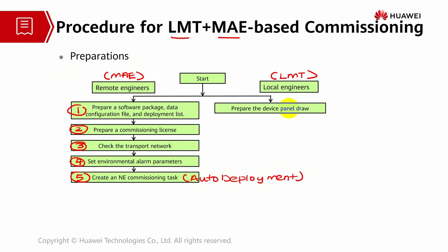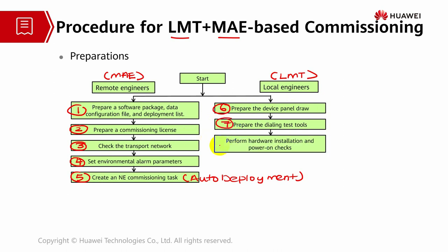On the other hand, the local engineer will prepare the device panel drawing regarding the whole design of the base station and the boards, etc. They will also prepare the dialing test tools, because once commissioning has been completed they have to do a service test. They also have to perform the hardware installation and power-on checks.